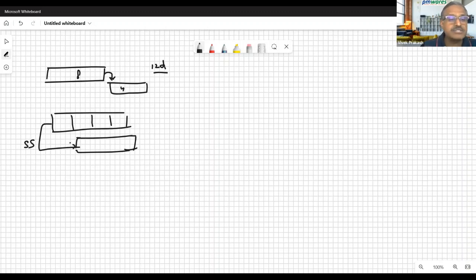But if I do start to start, it should start from here. But I want to start it from here. So what I say is start to start plus 2 days. Plus 2 days means a start to start with 2 days of lag.